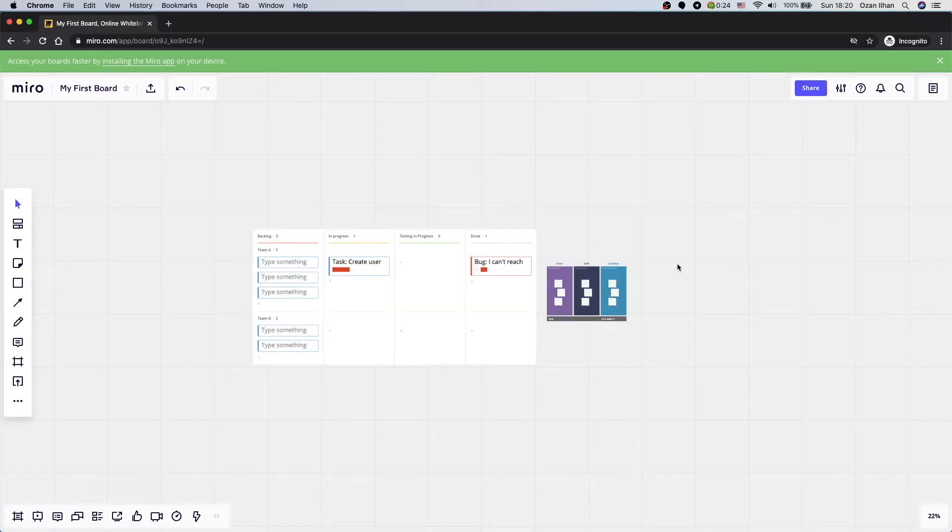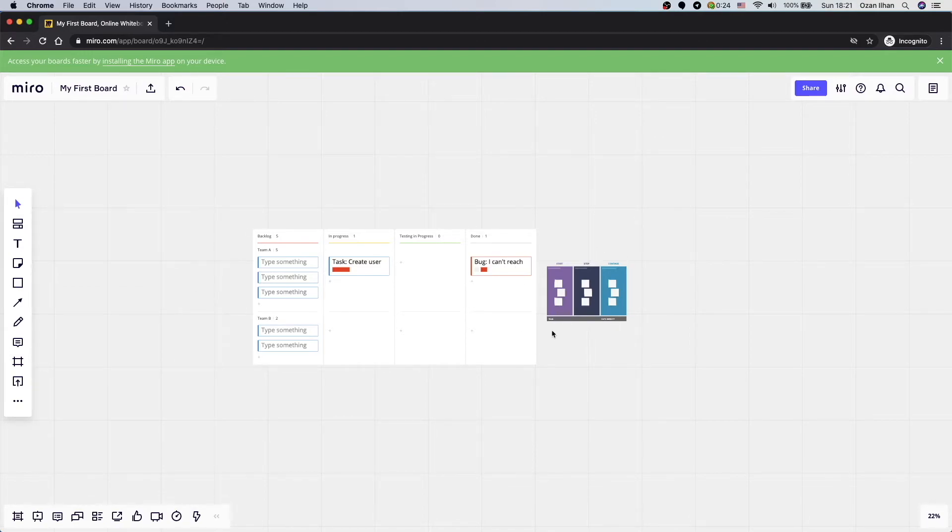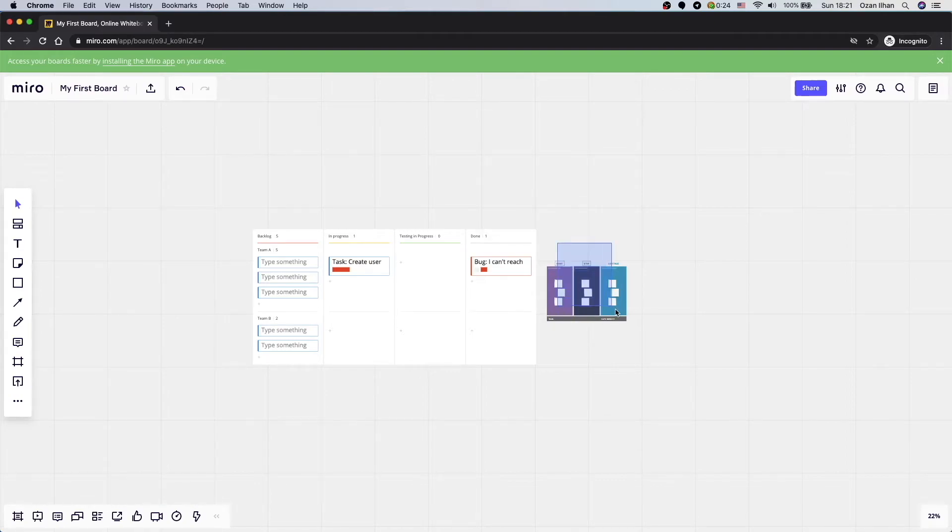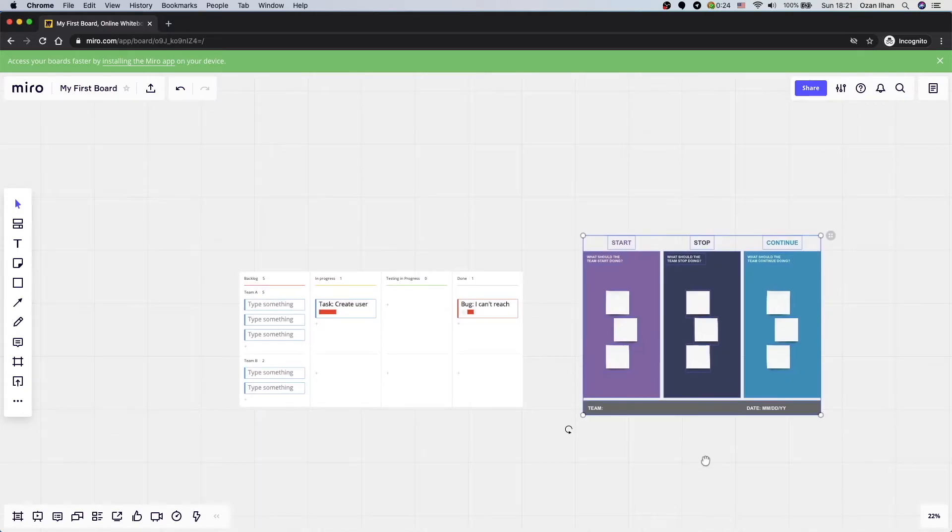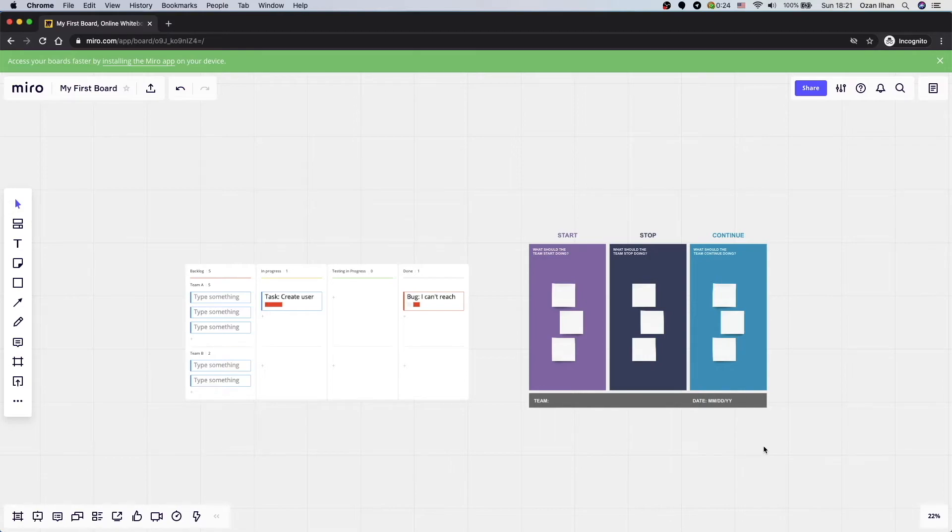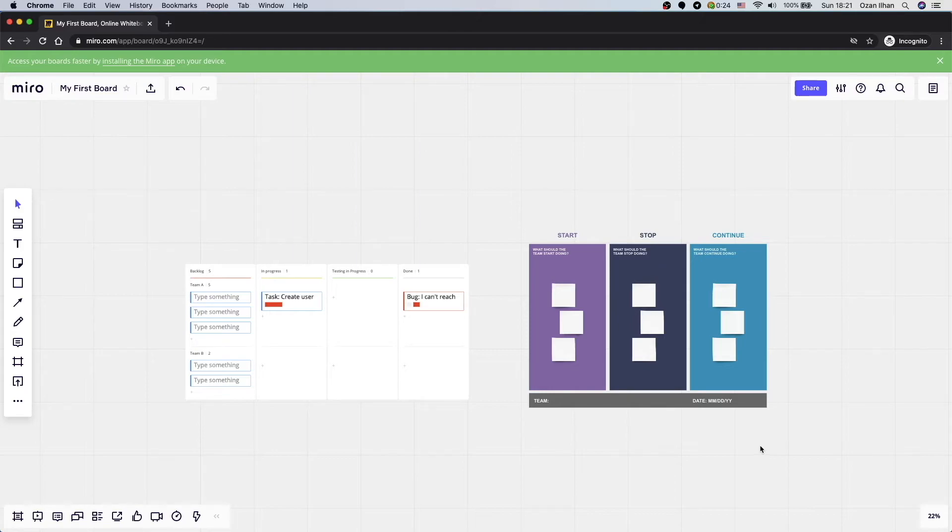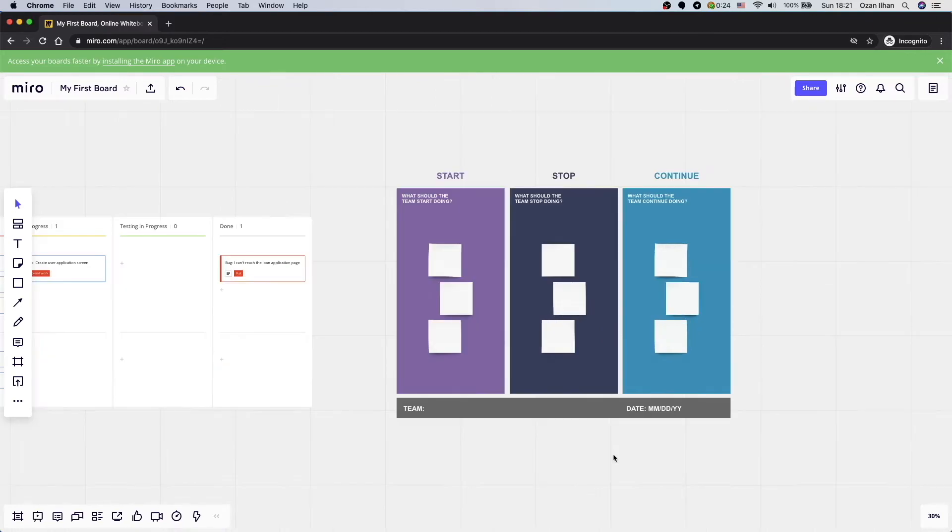Here, as you can see, this is the same board. I can add multiple templates. If I want, I can add multiple Kanban boards, multiple retrospective boards and much more. So this one, I will make it larger. Retrospective meetings are part of Scrum framework. And as a team, we have this meeting end of every sprint. For me, it is end of every two weeks. So in this meeting, we are continuously talking with the team what we can do better. So this template is really useful for me to organize and kick off that meeting. I just create this board, I share it with my team and everybody can see it.